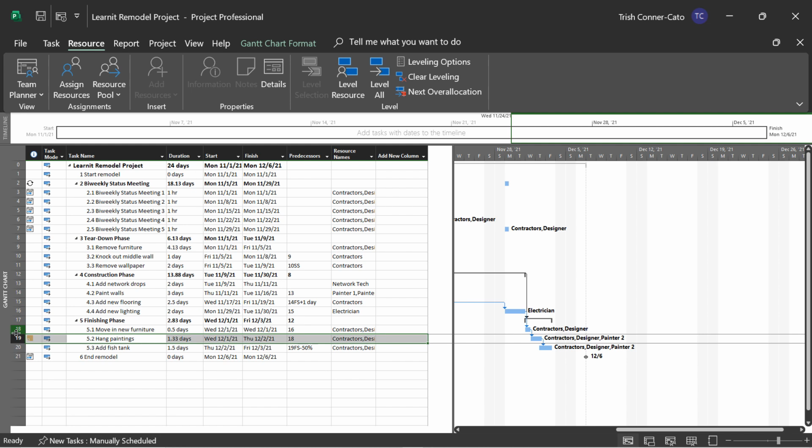The last thing we're going to do before moving on to setting a baseline, and this also comes under the heading of optimization, is we never accounted for the cost of the fish tank that we're adding. That is known as a fixed cost. It costs what it costs, and that's it. We can't capture it anywhere other than in the fixed cost column. So the fixed cost column resides in another table, and we don't have to switch to another table to access that column. We're going to just add it to this entry table.